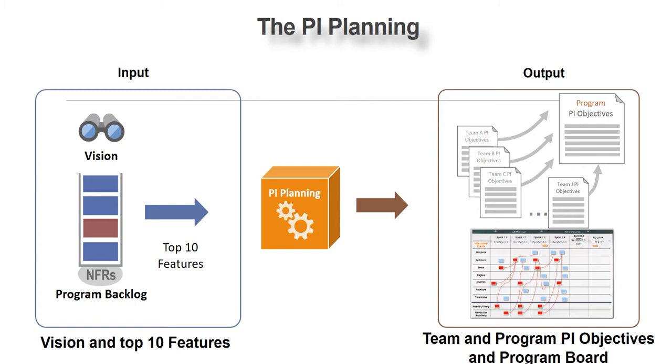Why does PI planning go for 2 days? We could have done it in one day. But what Scaled Agile says is have a sleepover, have a good night's sleep, and come next day and re-look at the plan. It has been found many a time that teams have missed something, or teams want to remove something, and hence it says, have a good sleepover, have a look at the plan. So next day when they come in, they look at the plan again and start talking about it again, and that is when the final draft is done.